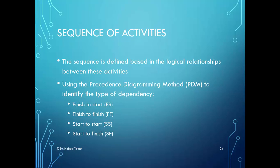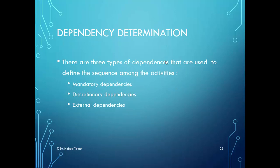The sequence of activities was explained in detail in the previous session through the network diagram and critical path calculations. It's very important to identify the type of dependency between tasks to determine when to start and end each task, which affects overlapping, duration, and resource assignment. There are three types of dependencies used to define the sequence among activities: mandatory dependency, discretionary dependency, and external dependency.